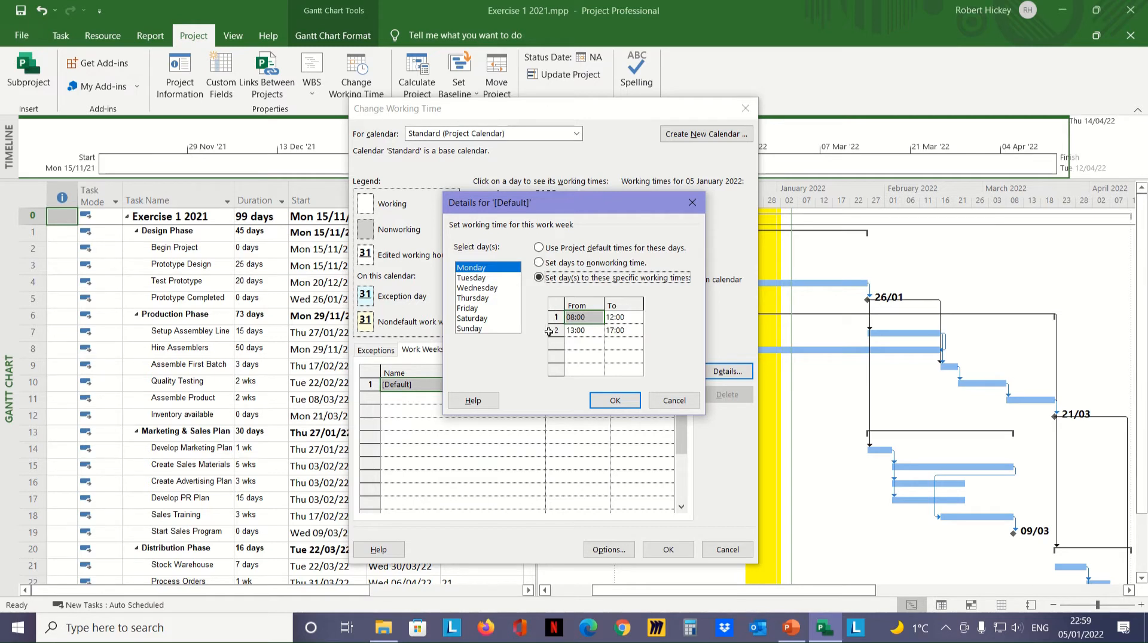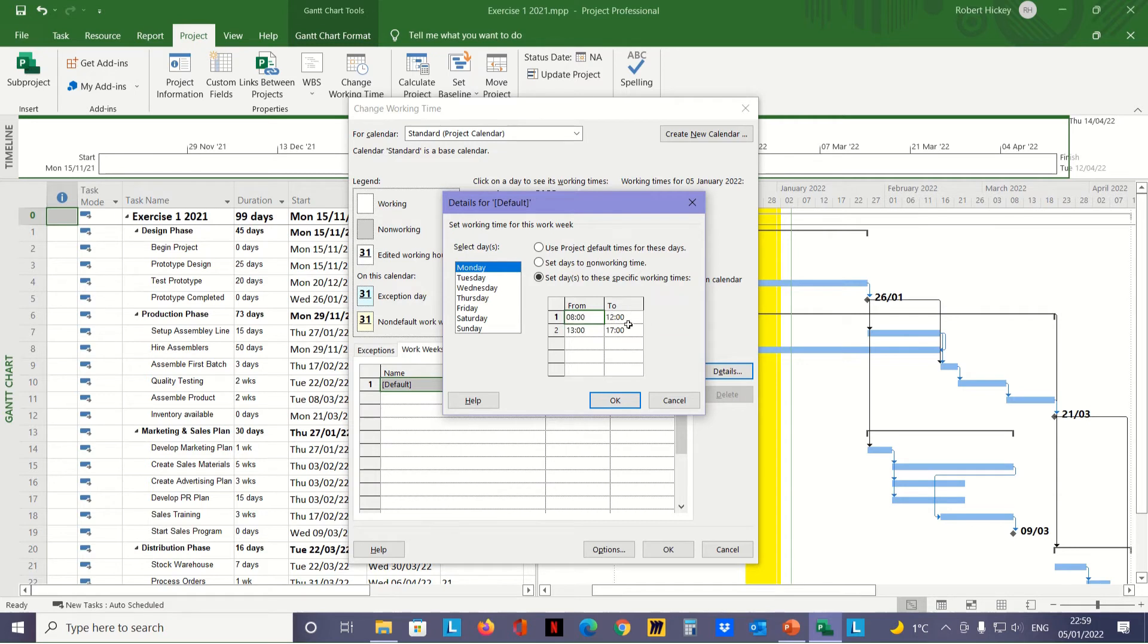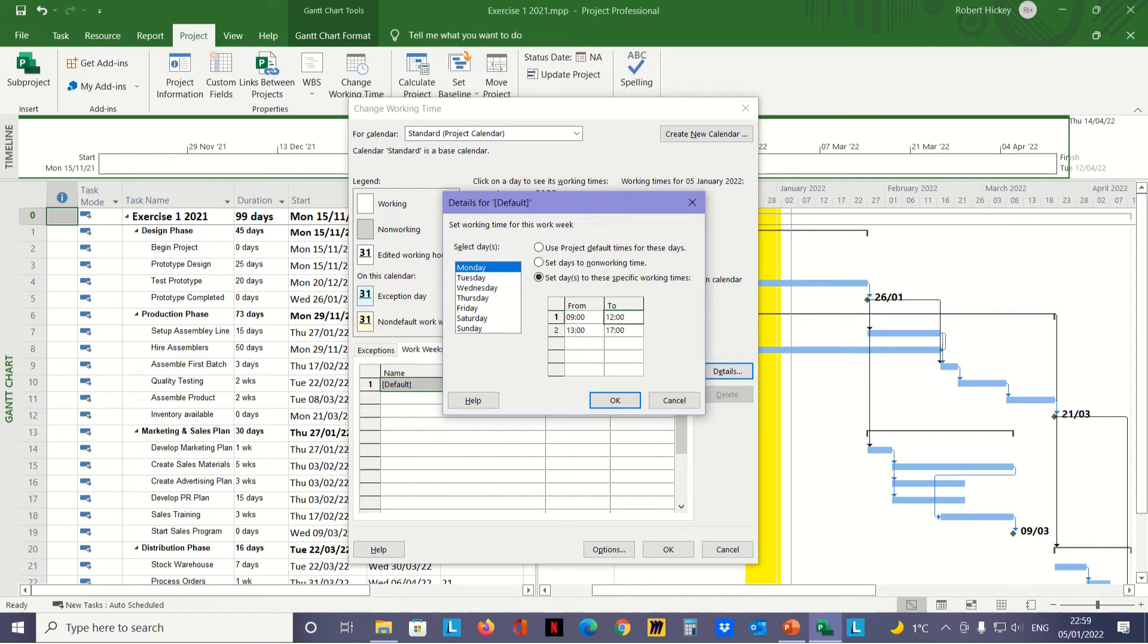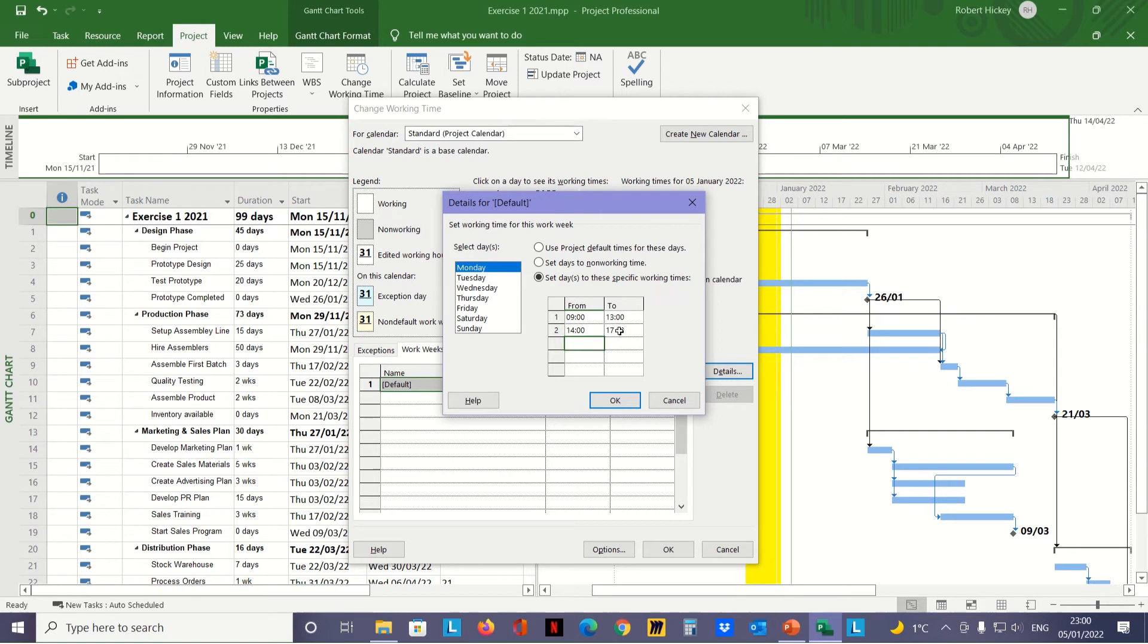The day is split into two halves. We're going to change the start time from eight to nine, so we select the first cell, type in 9, and hit return. In the second cell, we want to go up to one o'clock, which is 13:00—type in 13 and hit enter. Then we want to give an hour break. In the second half of the day, we start at 14:00, which is two o'clock—type in 14 and hit enter. We finish at 5, so that's fine. Now we need to do that for every day.